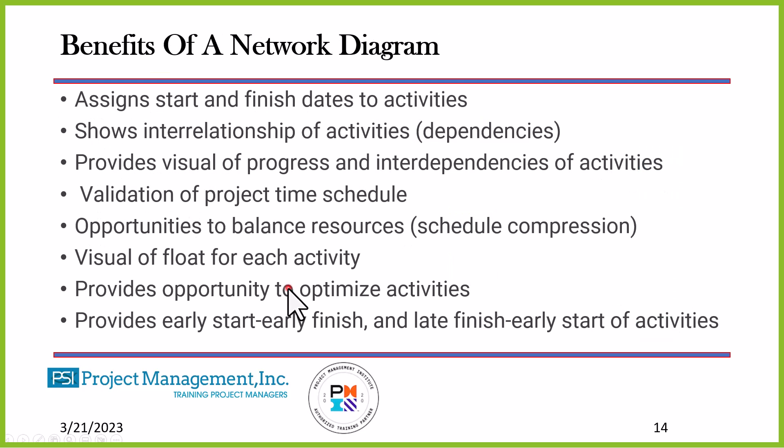What are the benefits of a network diagram? Most people probably use Gantt chart formats and have never done a network diagram outside of classes. Do we need one? First, it assigns start and finish dates to each activity. It shows the interrelationships and dependencies of activities. It gives us a great visual of progress and interdependencies. It is a validation of the project time schedule, and it shows us a pictorial view so we can understand the opportunities to balance our resources.